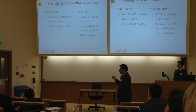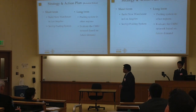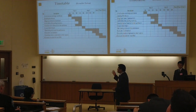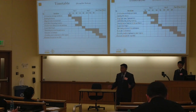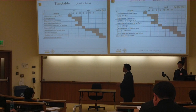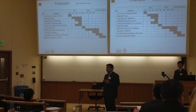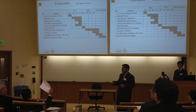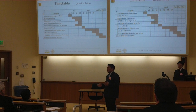And in the long term, we will also evaluate if this pooling system can be implemented in other regions, and also evaluate the CMC network based on future demand. And this is our timetable. In the first year, we will focus on building the new warehouse and setting up a new operating procedure manual for the new pooling inventories. In the second year, after we launch the beta project, we will focus on monitoring, evaluation, and feedback. And in the long term, we will do a feasibility study on whether this can be implemented in other regions, and also evaluate the need for new CMCs.